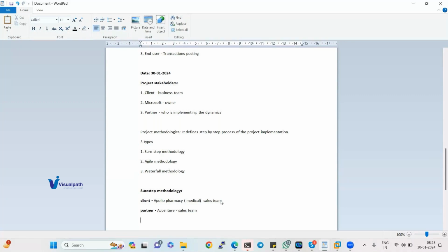What will the testing team do in the initial phases? They will simply sit idle, right? Because of the cost, I cannot give salary to the testing team without any work. So after 6 months, I will hire the testing team. Again, they have to consider everything and prepare the proper project timelines.